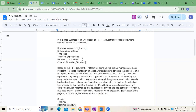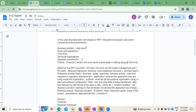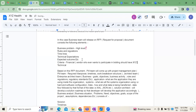Financial criteria means a vendor — whoever wants to participate in bidding — should have some XYZ turnover in the last three to four years. I'm just giving a rough figure. This is an expectation — a criteria — for who can participate.